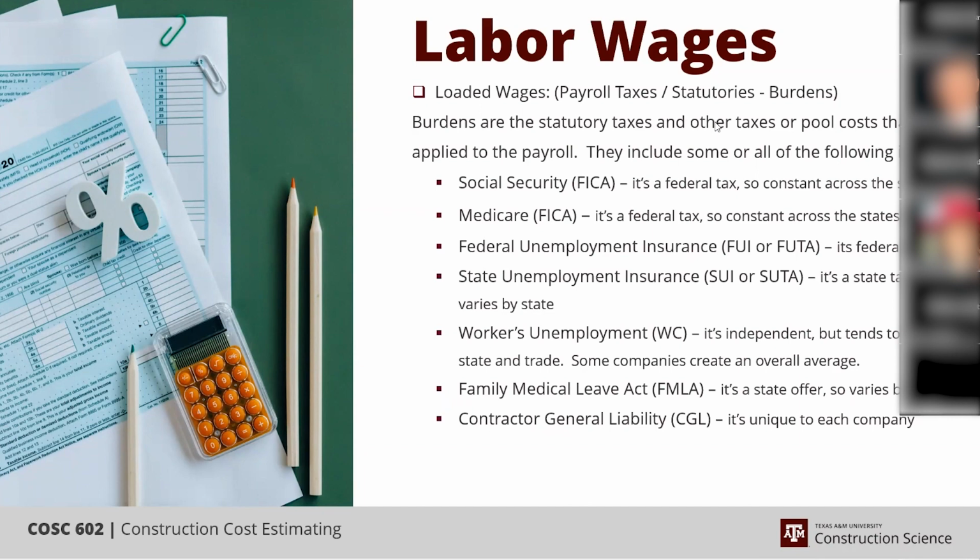They only see their $11 that they earned, which is what they work for. But that $1.10 gets pulled by the company and dropped into a bucket, into a pool. And then whenever that person takes time off, then that $11 an hour that really is $10, when they get their $10 per hour for time off, it comes out of that pool that the $1.10 went into as it accumulates. So that's your base comp, and that's how that gets paid.